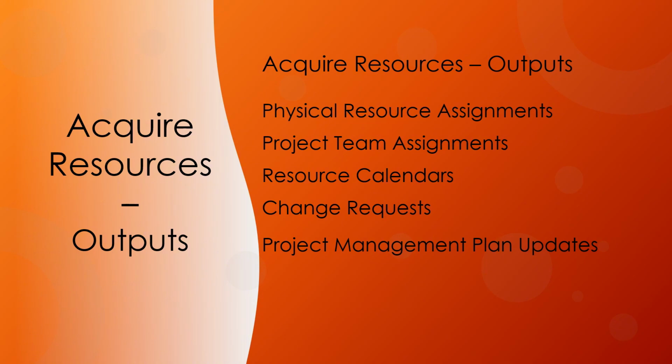Components of the project management plan that may be updated as a result of carrying out this process include Resource Management Plan. The Resource Management Plan may be updated to reflect actual experience in acquiring resources for the project, including lessons learned in acquiring resources early in the project that will impact how resources are acquired later in the project. Cost baseline. The cost baseline may change as a result of the acquisition of resources for the project.